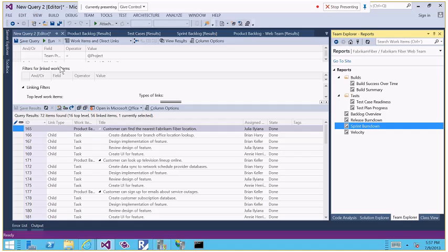Sometimes these reports are not real time because in the end this is a database that is in the reporting server and is made by the analysis services that has an OLAP cube of information, and this has to be processed. It can be processed every 8 hours, or once a day, or every 2 hours, or it can be processed manually.